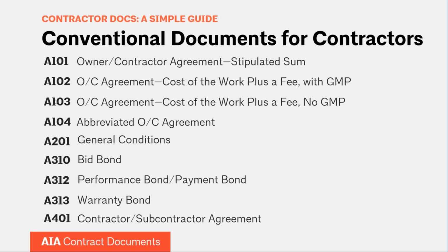There are some other differences between the medium and the large, and again, this is not an exhaustive list. So you'll have to look at the samples on our website that you can see for free to get a better idea. But there are some other differences, such as, for example, all of the documents allow the contractor to request evidence of the owner's financial arrangements to pay for the work prior to commencement of the work. However, only the A201 allows the contractor to request that kind of evidence after the work has been started, but only in certain circumstances.